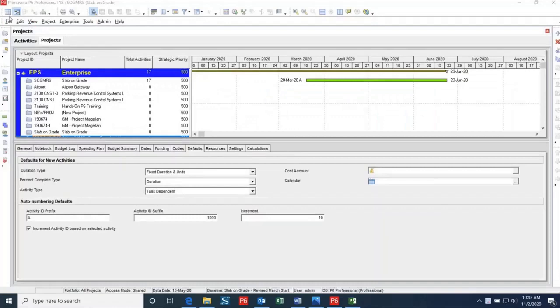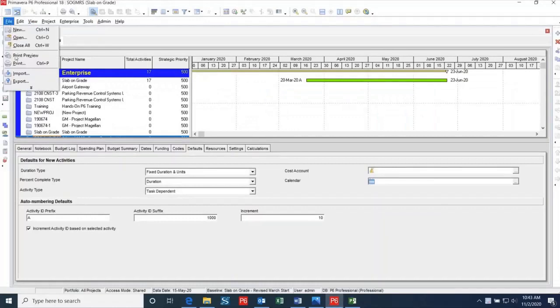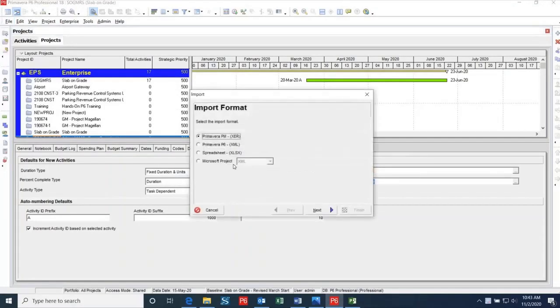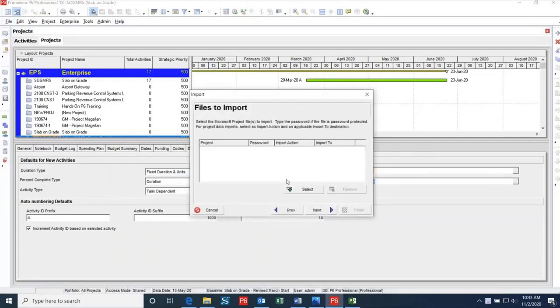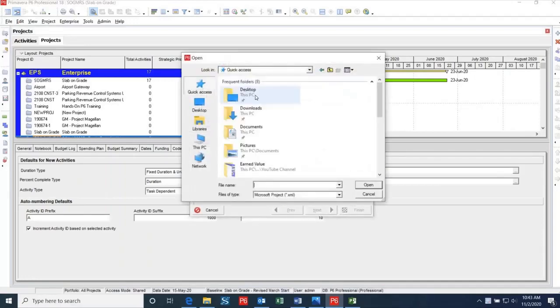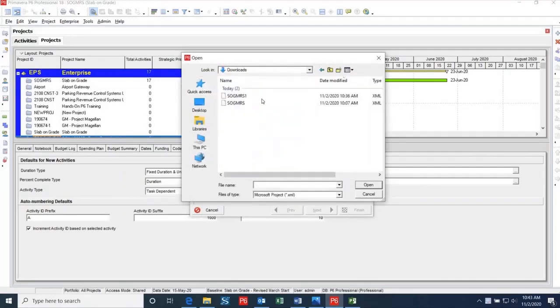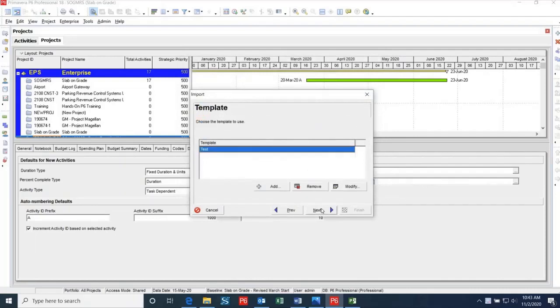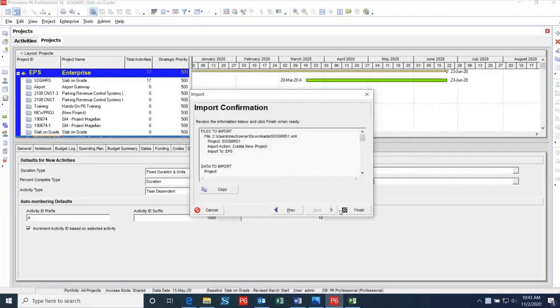I will then open up P6 and select File, Import, Microsoft Project, and then select XML. I can then click Select and find the file that we just exported from Microsoft Project. I'll use the same template that I exported with, so then I can click Next, and then Finish.